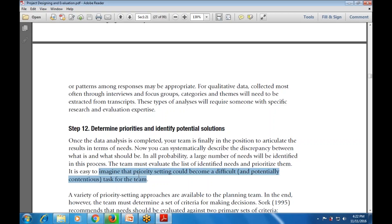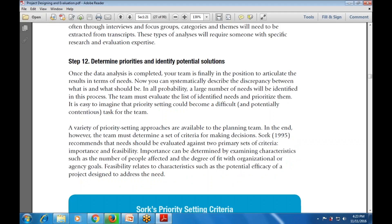Priority setting can become a difficult task for a team. A variety of priority-setting approaches are available, and needs must be evaluated against two primary sets of criteria: importance and feasibility. Importance is determined by examining characteristics such as the number of people affected and degree of fit with the organization's goals, while feasibility relates to the potential efficiency of the project designed to address those needs.